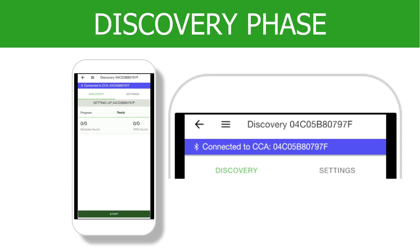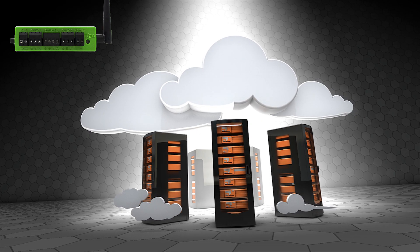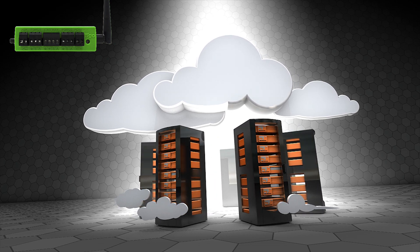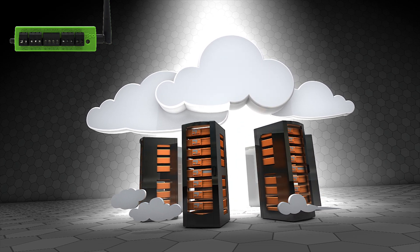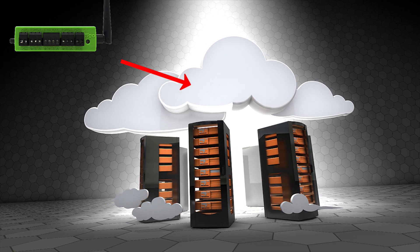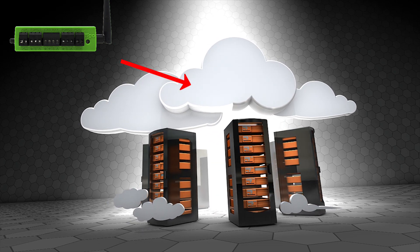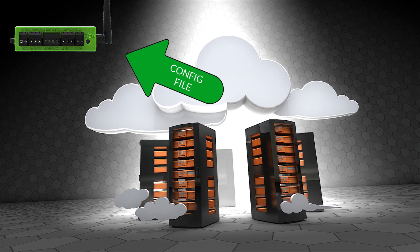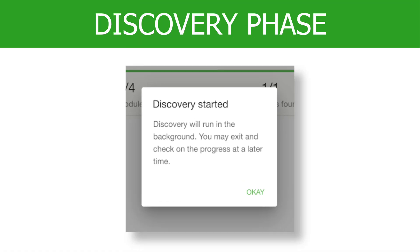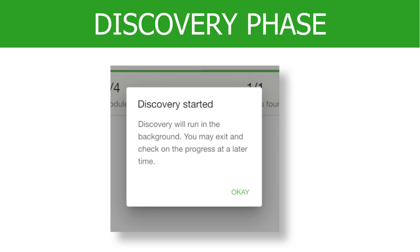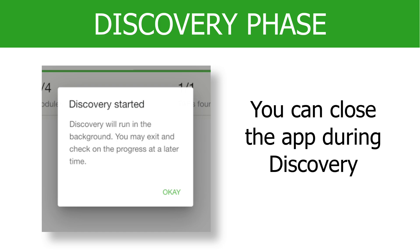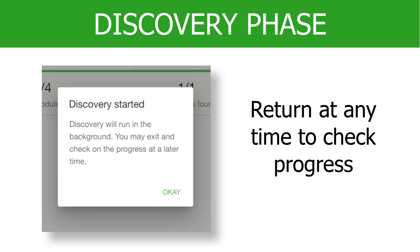Now we are in the final stages of commissioning. This last phase is called Discovery and it is identified at the top of the screen. During this phase, the CCA queries the Tygo server for the configuration file to begin the process of searching for each TS4 entered in the previous steps. This query and reception of the file can take some time, but it is usually complete within a few minutes depending on network quality. Discovery automatically begins once this file is received. A message will appear stating Discovery will run in the background and it is now safe to close the app. You can log back in at any time to check on Discovery progress.